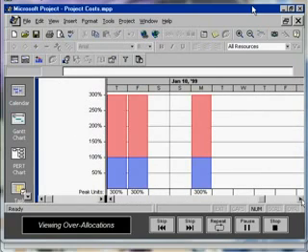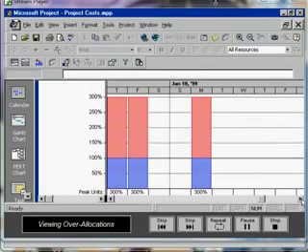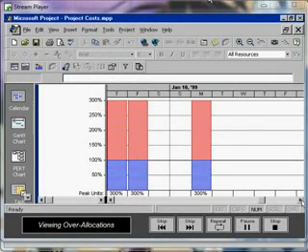The resource graph shows not only the allocation of the resource per period, but also the maximum number of units available, and what part of the total allocation is over the limit. The problem with the distribution staff is there are 15 units, but only one is being used. The blue bar indicates the unit being used, the red the over-allocation.